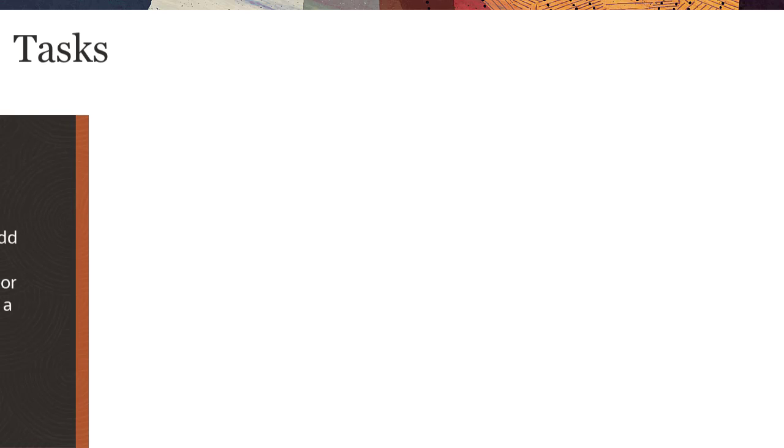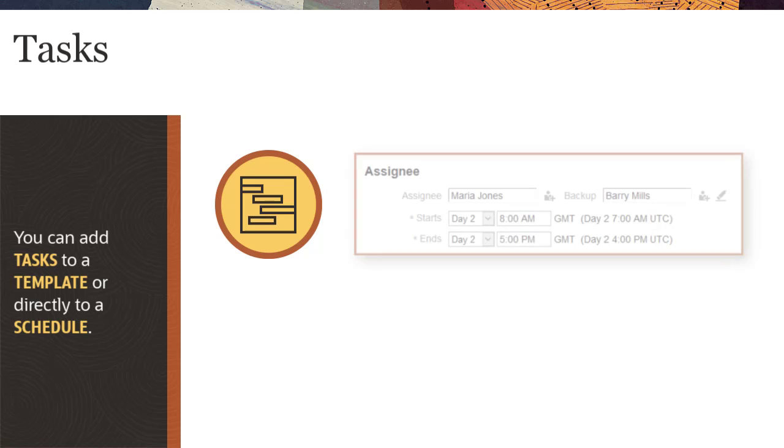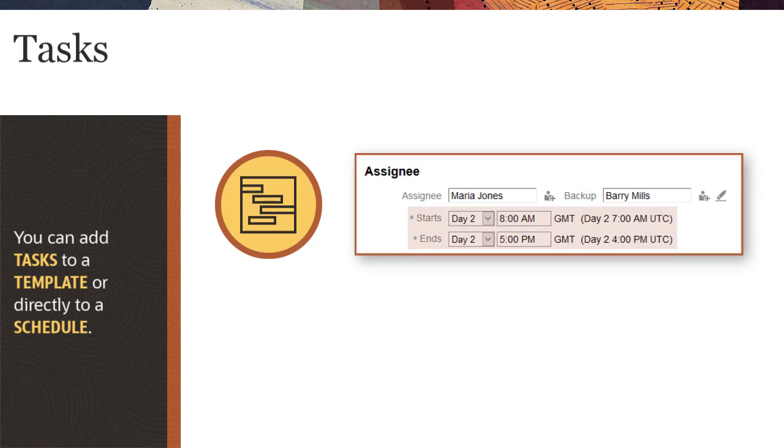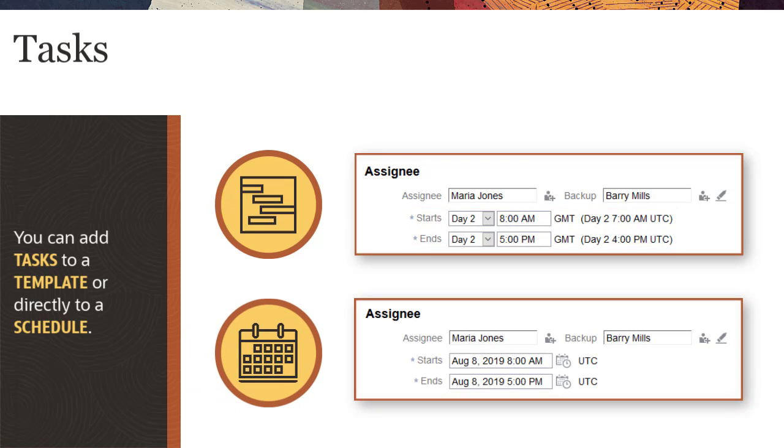You can add tasks to a template or add them directly to a schedule. When you add tasks to a template, you specify the start and end days as the number of days before day zero. When you add tasks to a schedule, you select calendar dates for the start and end days.